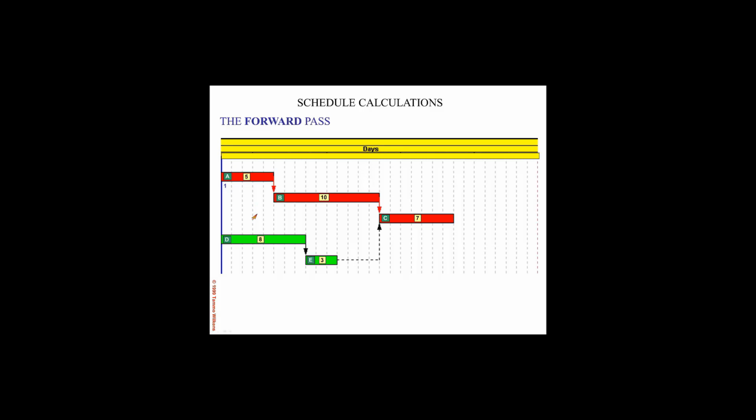So the computer uses a formula to calculate the finish date. That formula is that the finish is equal to the start plus duration minus 1. The minus 1 is there because the dates are counted inclusively. Days 1 through 5 are all working days. There is another convention that some schedulers prefer, called the noon convention, but the much more common one is the AM-PM convention.